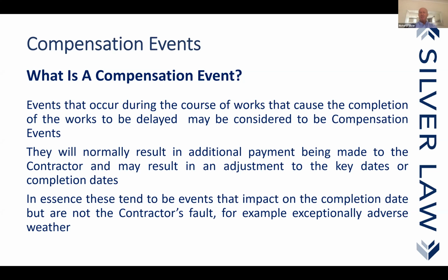And it's all wrapped up into one. So we don't have this situation where we've got to deal with an extension of time and separately loss and expense and separately variations. We only have one thing, a compensation event. That is it.